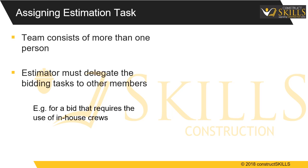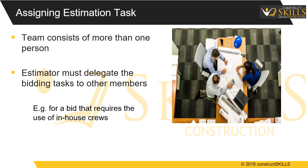If the estimating team consists of more than one person, once the scope of work has been identified and a schedule prepared for the bid package, the estimator must delegate the bidding tasks to other members of the team and communicate the deadlines for completion. For example, for a bid requiring in-house crews and a schedule to be submitted as part of the bid, the estimator may assign the in-house work to the person responsible for the in-house crews and the schedule preparation to the company's scheduler.